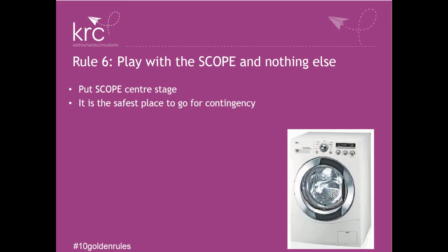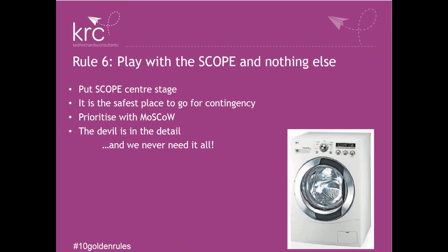So one of the best things to do when you get some funnies on a project, as I say, is play with the scope. So prioritizing with MoSCoW, things that must be there, should be there, could be there, and also very importantly won't be there this time, gives you that ability to move around your features and hit the deadline and protect quality. The devil's in the detail, and this is where you'll get a lot of your room for maneuver.